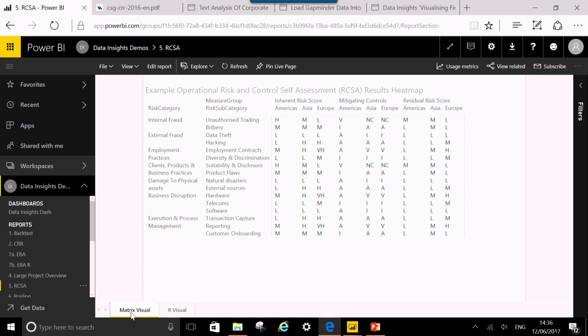And then obviously, if we've got risks, we put controls in place to alleviate or to mitigate those risks. And those controls could be not controlled, adequate, inadequate, or vulnerable. We've got a 4-point scale for those risks. And as a result of applying those controls to those risks, we come up with the residual risk score. Hopefully, that's a lot more lows and mediums than before.